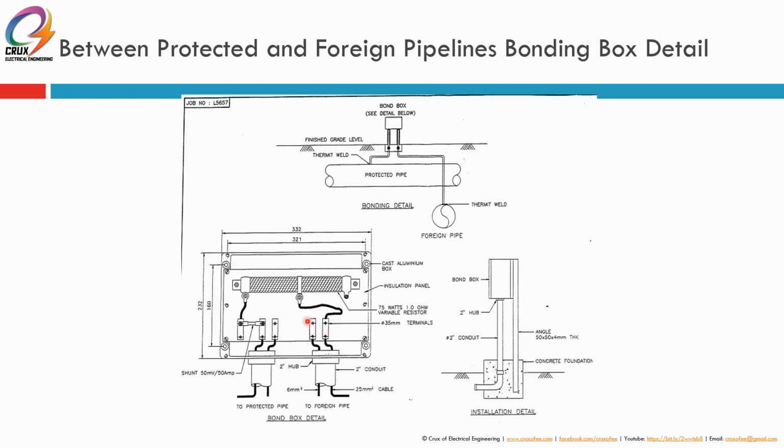Okay. So these are some of the harder parts for the cathodic protection companies to do commissioning. Because if they have installed a new pipe alongside old pipes and they have separate ICCPs, it's quite troublesome, because they not only have to commission the new cathodic protection but also the old cathodic protection. It's very complicated. Those who have been in the cathodic protection industry would know the complication of that.